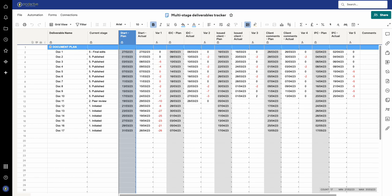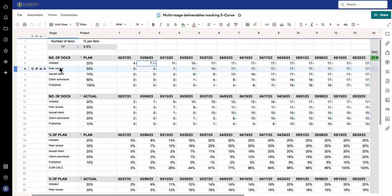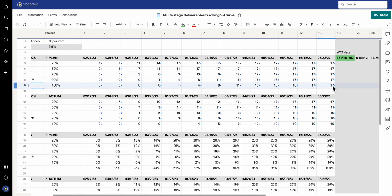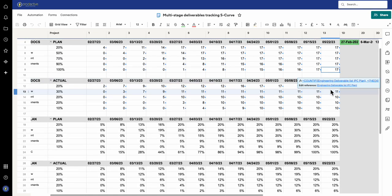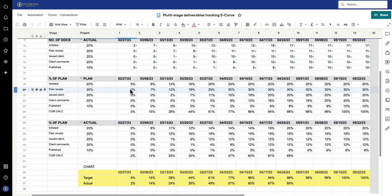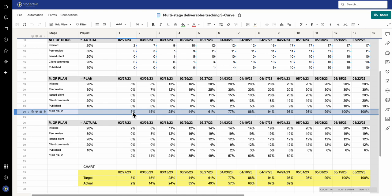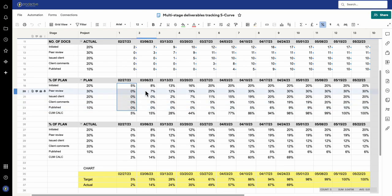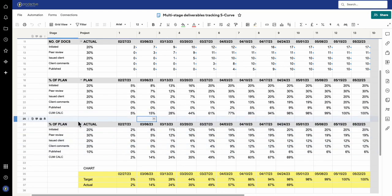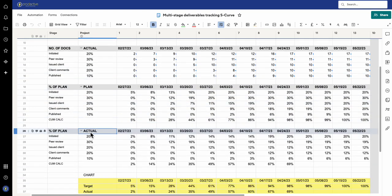That's that piece, and what you then need to do is repeat that for each of the various stages — how many documents were due to have been peer reviewed, issued, etc., until finalizing. You'd hope with your plan that if you've got 17 documents, by the end all 17 are there. Now if we turn this into a percentage size — this is why we have this percentage number here — it enables you to work out what is the percentage value of delivery at each stage. It's saying five percent, and this row down here is doing a cumulative value to say: in this week, what value has been delivered, then what percent has been delivered, doing a cumulative value as it goes through. Eventually it hits 100, so the plan should always top out at 100.